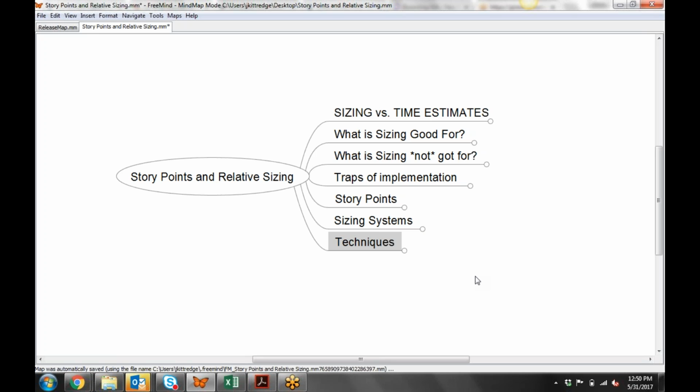One thing I did, a very interesting exercise, probably 6 years ago when I was working for the product management group, and this is how I think life should work, but that doesn't really matter in the grand scheme of things. We basically took all of our stories and spread them out on a table. I gave each product manager fake money, like $1,500 worth, in $10 bills. And I asked them to put how much money they would pay, given that they have limited resources, on each of the stories in their relative order of importance. Afterward, I counted up how much money each story got, and that became the relative business value of each story. It was a fairly simple exercise, but when I took the fake dollar value of these stories and the estimate, now I could get to that ROI.